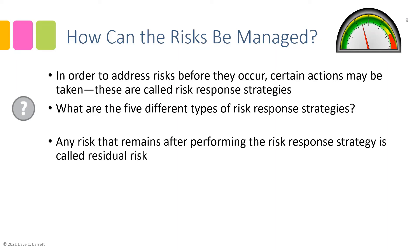Not all risk responses completely eliminate the risk. In fact, only risk avoidance — where the risk is completely removed from scope — does so. Normally some risk remains; the probability and impact do not go to zero. Any remaining risk after performing a risk response strategy is called residual risk.